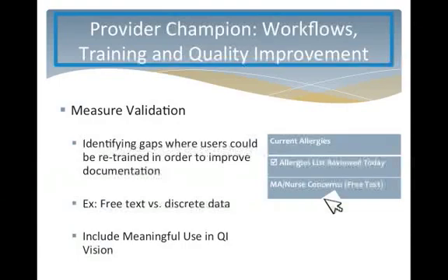For example, during the go-live period we started, it was important to check allergies, but we didn't specify if it should be the provider or the nursing staff. In some cases, providers were doing double work and asking about allergies when the nurses asked the patients already. In other cases, the providers assumed, without asking, that allergies were already checked and verified. Sometimes the nurses were free texting or writing the allergies in a free text field. That data was not getting captured. For meaningful use, we need to make sure that we maintain an active medication allergy list.